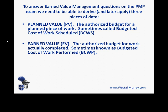So then let's think about Earned Value. This is the Authorized Budget for work that's actually been completed. This is sometimes referred to as the Budgeted Cost of Work Performed, which again helps you remember what Earned Value is.